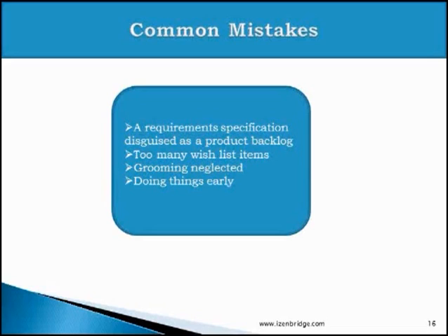Neglecting grooming results in a lot of time being spent discussing or grooming the stories during the sprint planning meeting. If the stories are not groomed well, and the product owner comes with product backlog items which are not sprint ready, the team as well as the product owner may spend a good amount of time during the sprint planning meeting grooming those product backlog items, and the side effect of this would be that they will not get sufficient time for the activities which are expected to be done in sprint planning.